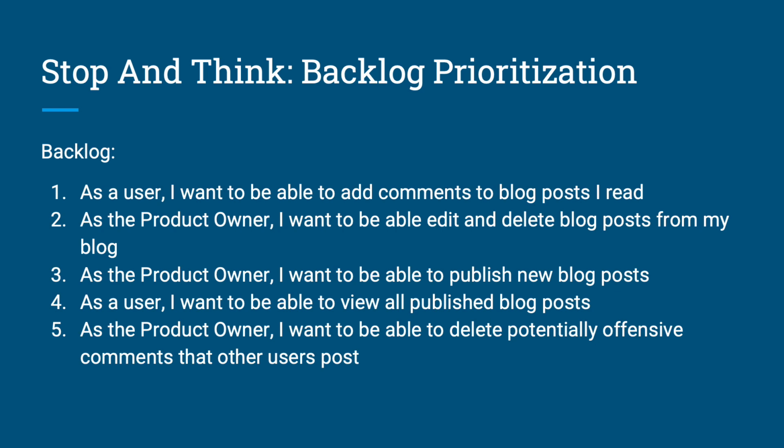But to do that, I need the ability to sign up, log in, etc. That wasn't even listed in my backlog. This is a good example of how the agile approach encourages and is resilient to change. At this point, getting user accounts set up and working is the next highest priority, so I can add that story to my backlog and get to work on it.